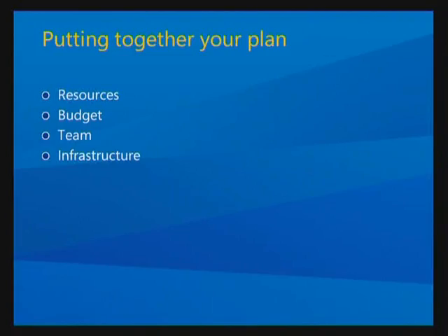And again, your team. You need your IT owner, your business owner, your executive approver, and your project manager.